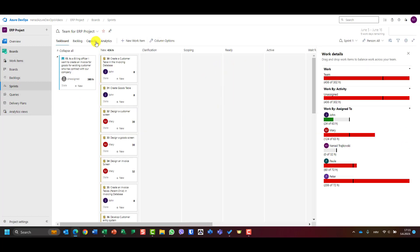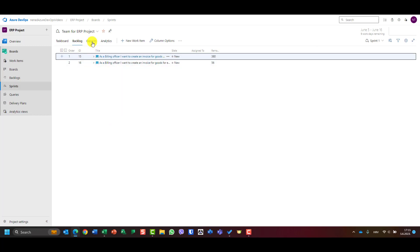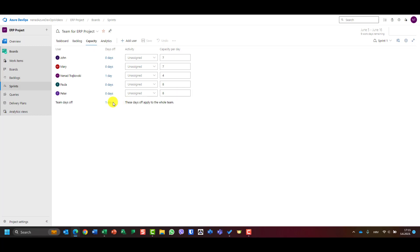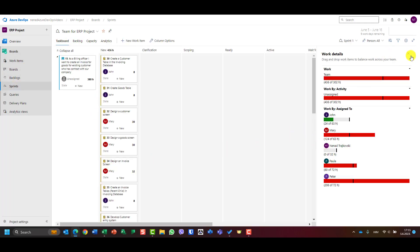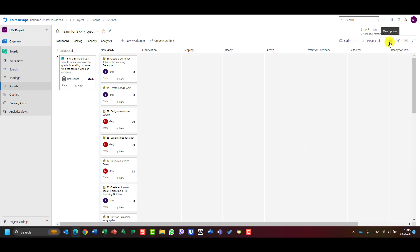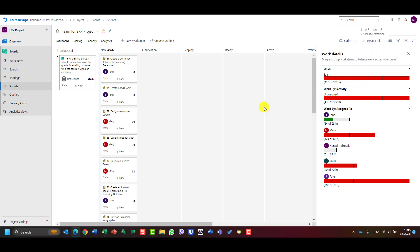In my first sprint I have two user stories. Let's go to backlog. According to the capacity of each team member and the holidays which apply to all team members — let's go to the task board. If you go to view options, choose side panel work details. In work details you can see that the total capacity of the team is 302 hours, but the team is allocated 436 hours. John has allocated 24 hours and he is available 63, Mary 124, Paula 80, and Peter is way over-allocated.